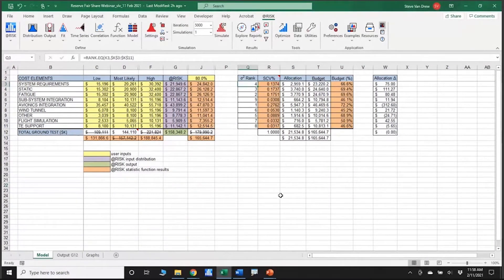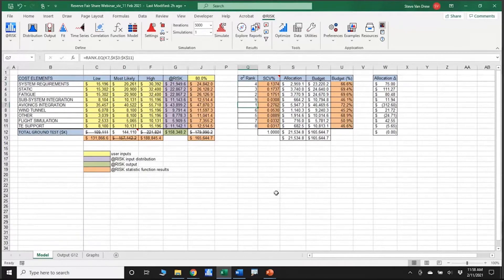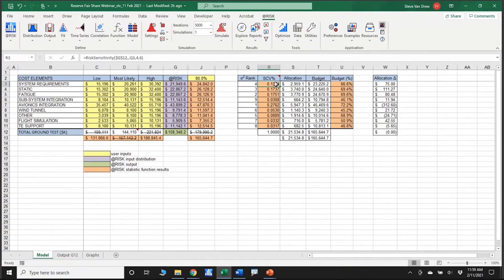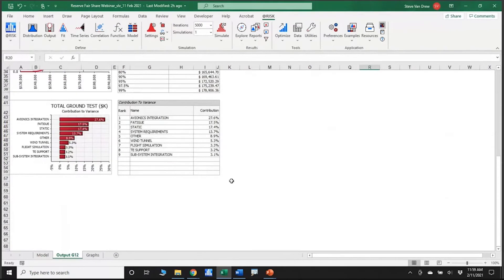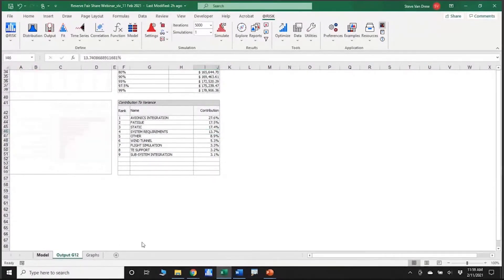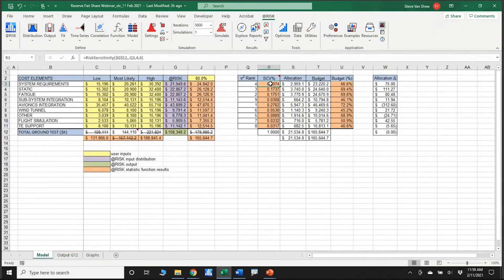The ranks are one through nine, and I normally don't pay attention to that rank number. But because this stat function needed it, I needed a way of identifying each element's rank. What I ended up doing — and it worked in this case, though I'm not certain it always will — is treating the ranks as a ranking of the individual variances from the simulation results. The largest variance was avionics integration, so I put a one there, and used an Excel function for the rest. Now the stat function pulls from the simulation results — for example, system requirements shows 0.1374, or 13.74% as a percentage.